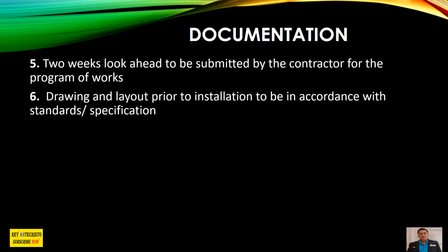For example, I am the contractor, so I'm from the design engineering or FEED engineering, the FEED group. So we are submitting these documents together with the transmittal to the client, and then the client, the owner, reviews all the drawings. If they find any additional inputs, those are to be commented, in the CRS or any information.